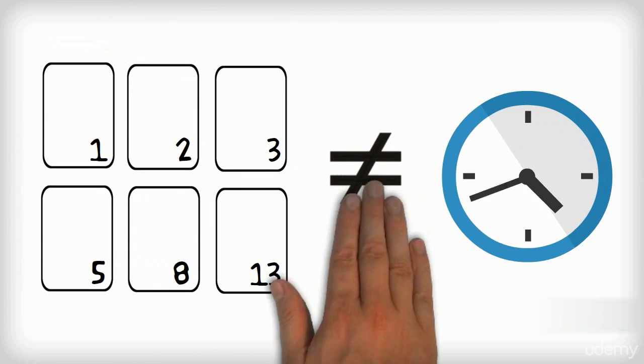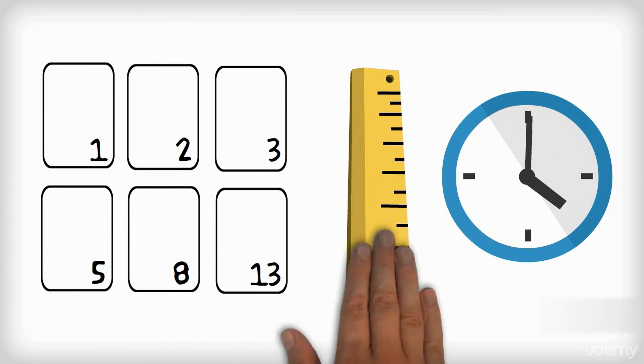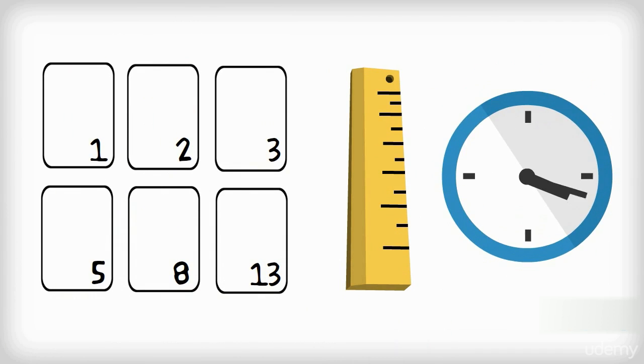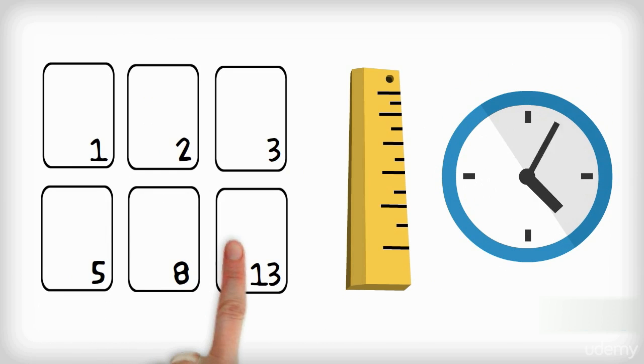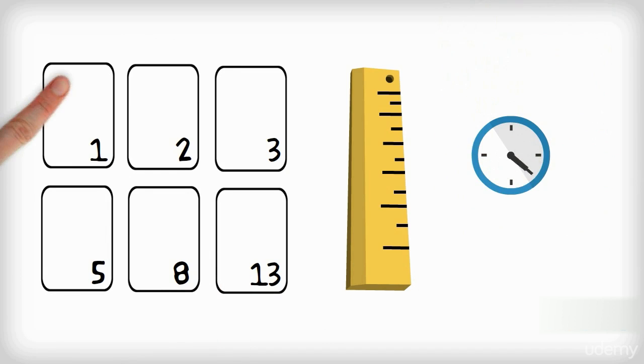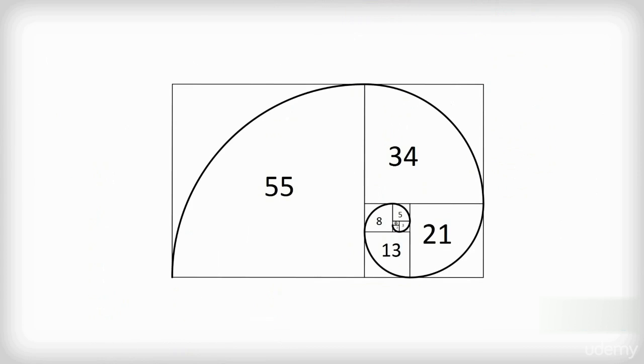Story points are not a measure of time, but are proportional to time. In other words, a user story with a higher number of story points would typically take longer than one with a lower number. One popular scale, and the one I recommend for estimating story points, is the Fibonacci scale.